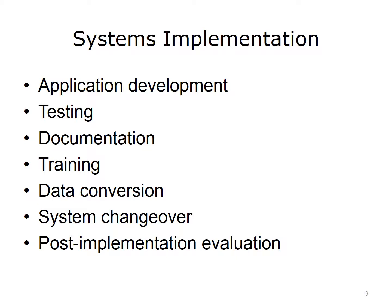At the systems implementation stage, the new system is built. It involves application development, testing, documentation, training, data conversion, system changeover, and post-implementation evaluation. Application development is the process of writing the programs and code modules. Analysts and programmers use traditional structured or object-oriented methods to translate the design into a functioning application. Testing is performed throughout the systems implementation phase. Accurate documentation describes the information system and helps users, managers, and IT staff by increasing the usability of the system, reducing errors, and improving productivity.